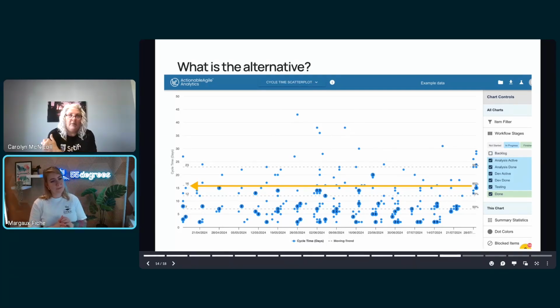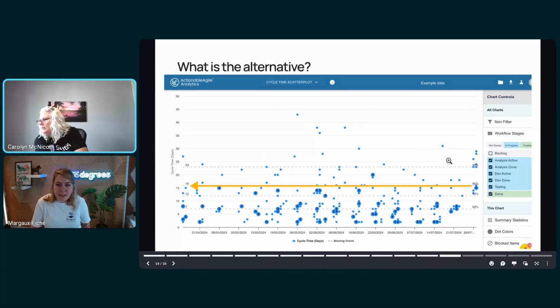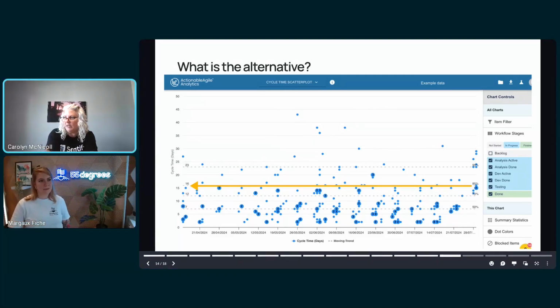And if you compare this to, say, your customers, well, you know what, based on our history, 85% of the time our work is done in 16 days or less. So I'm really confident that we'll have your work done in that time or less. And maybe it's going to be 20, but still, what is it? Where's the 90? 95 is at 23. So even if you have to wait until you're 95% confident and say, we know we'll get it done in